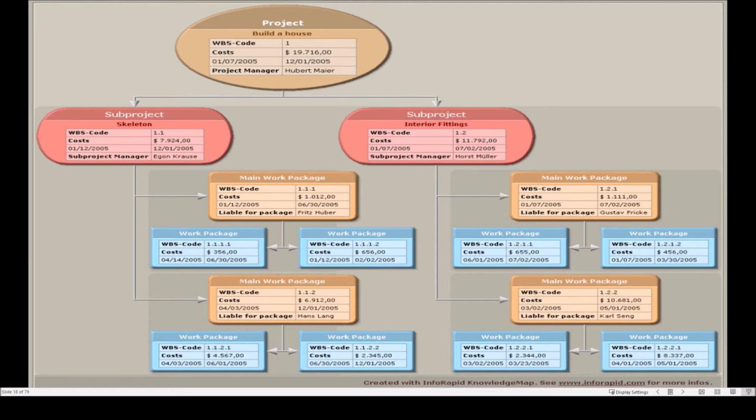So we've decomposed like the previous slide. We've unpacked the project from the top down, and as part of that, we've gone, let's see this one here where my mouse cursor is, 1.1.1. Let's just describe this one as foundation. And then the blue one, which is subsequent, these are tasks that drive these, so broken down even further. This might be about digging out the foundation, and this might be about pouring the concrete. So we've unpacked this way, we've decomposed, we've unpacked the activities this way. Now we want to build up the time and the cost from the bottom upwards.